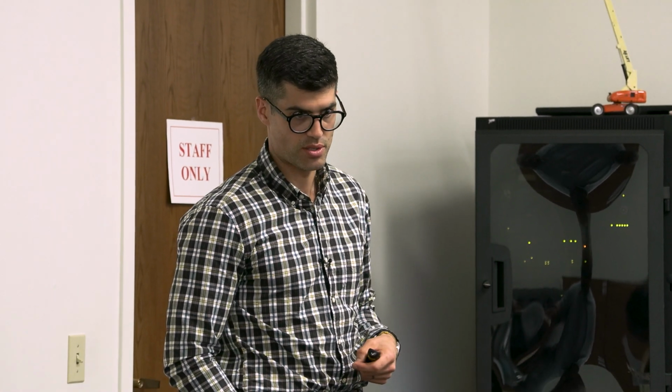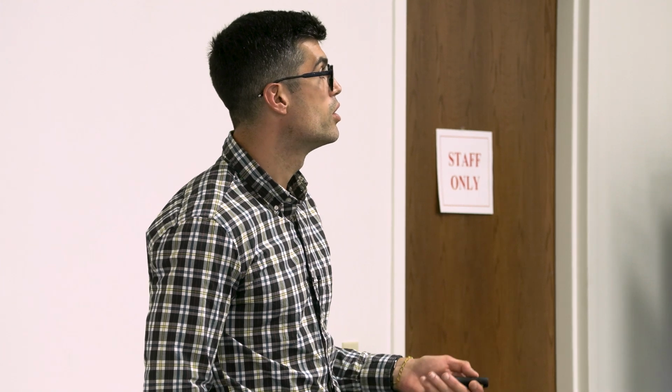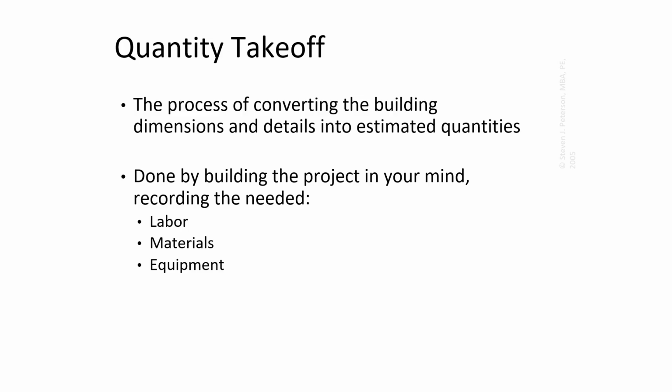Concrete cubic yardages, for example. I might not do all the concrete, but I'll check some columns, some floors, some spot footings. I'll check certain numbers that are really going to be impactful, to make sure I'm comfortable with that subcontractor's bid, right? But this is, again, done by building the project in our mind, and that is knowing the process, knowing the labor, materials, and equipment that are needed to complete that specific scope of work.